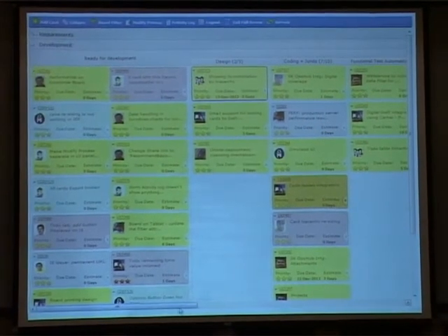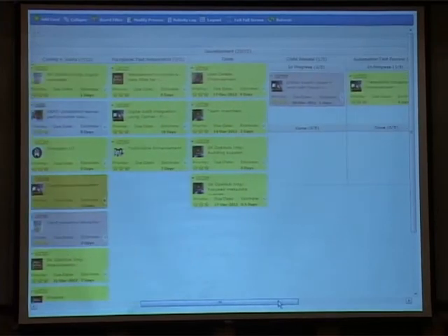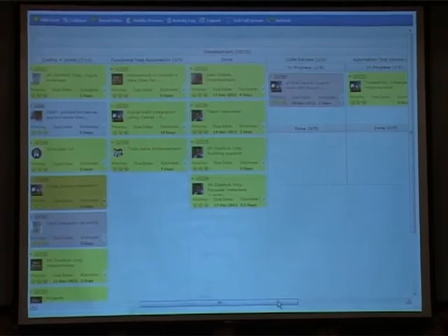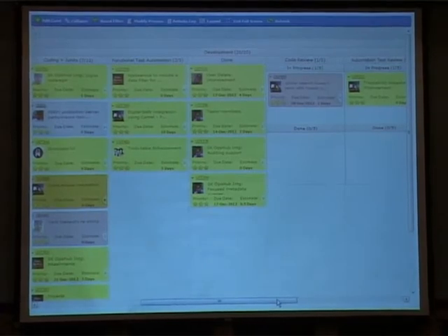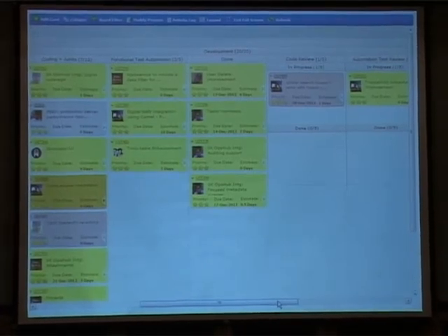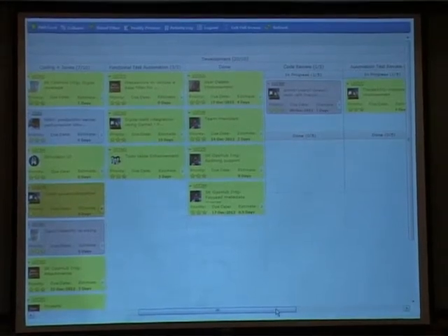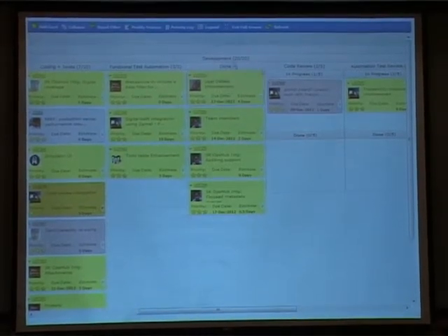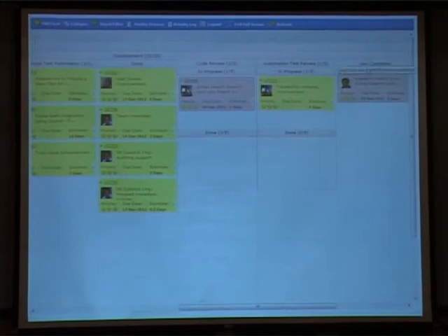One of the other things that people might be wondering is that Kanban systems do encourage a pull-based work model. Essentially, the principle behind it is that nobody sitting at the top is pushing work down onto the developer's plate. And the way you do it is you implement a buffer lane here. This is the buffer lane, a done lane, or a dev complete lane.